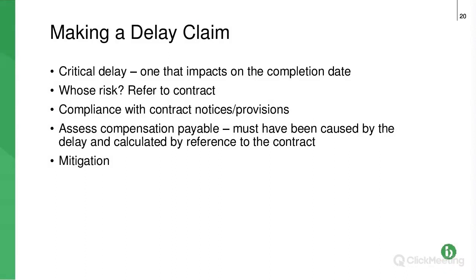And the site team are all critical because they understand what happened on site and the realities of the situation. It's all very well doing a program, but if you couldn't get access to something for another reason, that's where the site team come in, because they can say, well, this is what was actually happening on site. I sent an email saying, well, why can't we get access? The programme says we need access. So as I say, it's a team game.